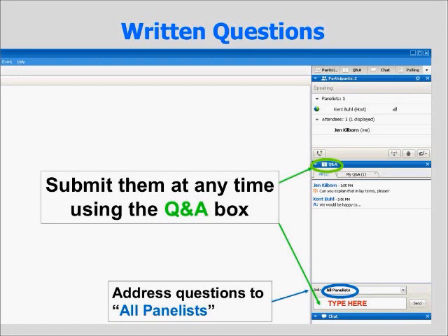But there are two sections in the regulations. There's a section under 58.35(a)(3), and there's a section under 58.35(b), and within there you will find the criteria that require different kinds of considerations, if you will, of what's going to happen with the rehabilitation that make it substantial or not substantial.